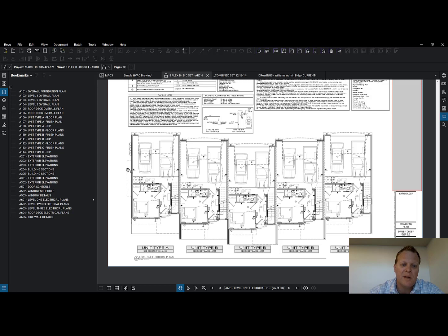Maybe get it to go up in one area so you can really protect just this one cavity from here to here, and everybody knows. Paint it on the ground, talk about it in the sub coordination meeting. This is where all the refrigerant lines are.